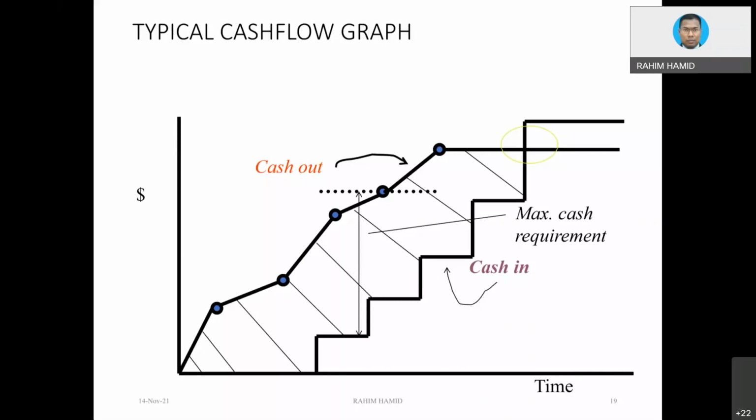So from our calculation, we can assume that the advance payment will be paid here at the beginning of the project. Let's say maybe 10% of contract value, but subject to a maximum amount. Maybe 10%, 15%, I couldn't remember. Let's say that would be the advance payment.